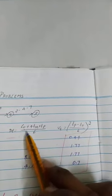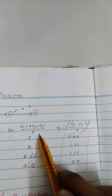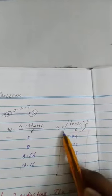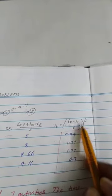It's having two different formulas. One is T0 plus 4TM plus TP by 6. This is the duration one and variance TP minus T0 by 6, the whole square.